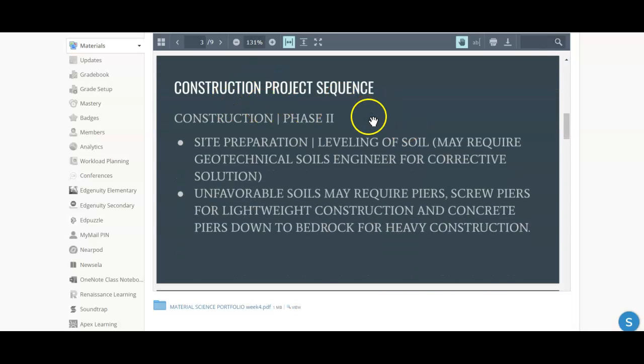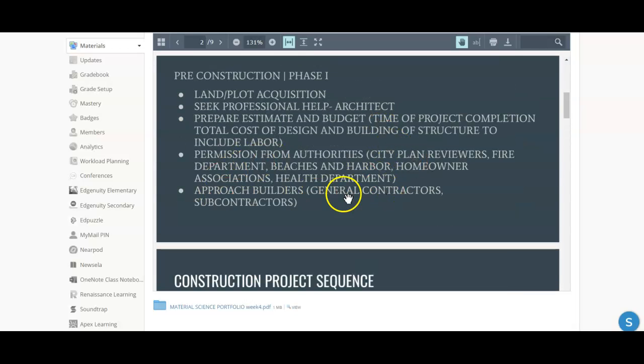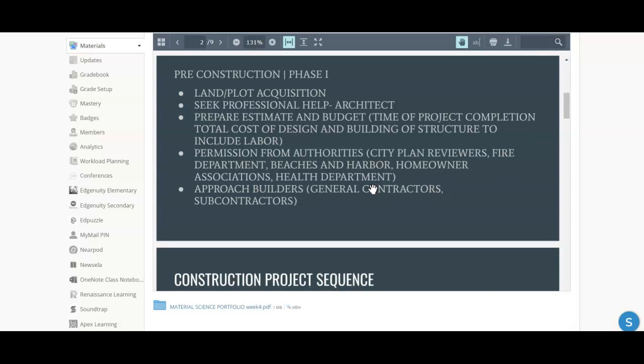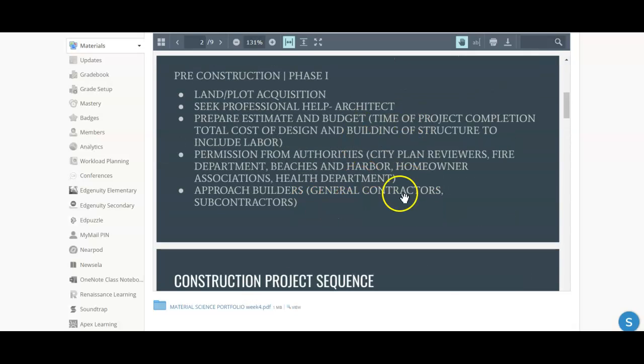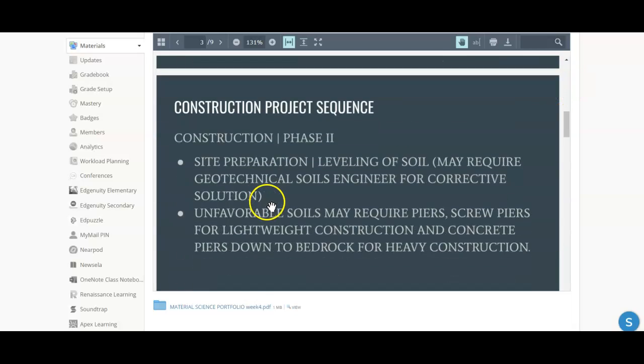And then you have the construction project going on. Once you get the plans back and the client says, okay, let's go with your general contractor, or I have my own general contractor, they'll sign a contract with the general contractor, separate from the architect's contract, unless the architect's a design builder with in-house general contractors. Once they get the plans back from the city and it's approved, they can go build.